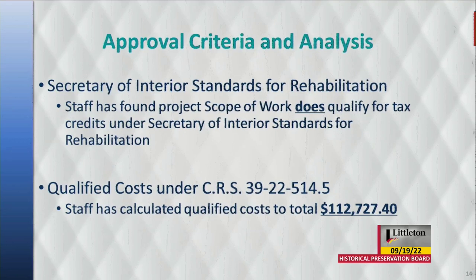And so in the staff's review of this application, we did find that the project scope of work does qualify for tax credits under the Secretary of Interior's standards for rehabilitation and the qualifying costs. And the qualified costs total $112,727.40. So if this is approved tonight, the applicant is entitled to a credit of 25% of that number.